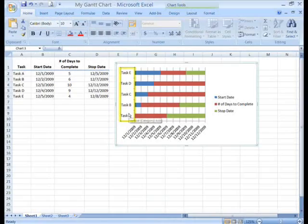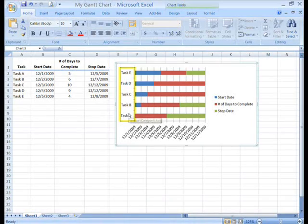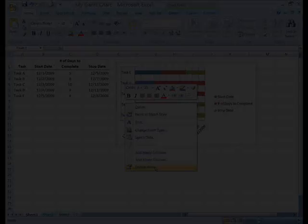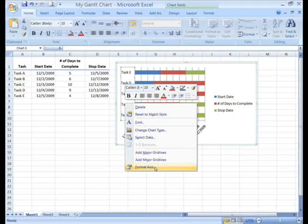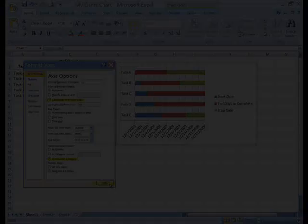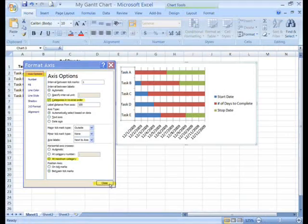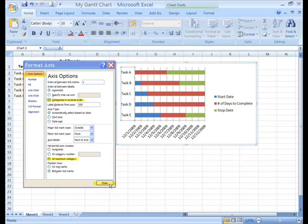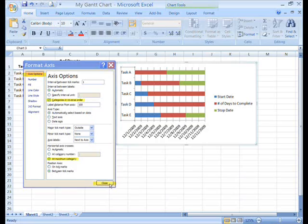Next we'll make changes to the vertical y-axis. Click on the tasks to select it. Right click on it to open the menu and click on format axis. The values in our chart go from E to A. We want to reverse that. In the dialog box, click inside the check box next to categories in reverse order. Under horizontal axis crosses, click in the circle next to at maximum category. This keeps our horizontal axis at the bottom of the chart. Finally, click the close button.